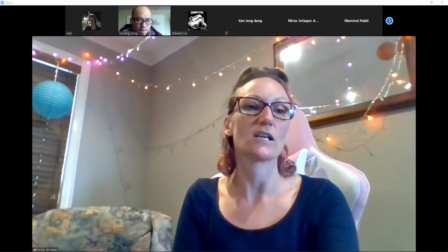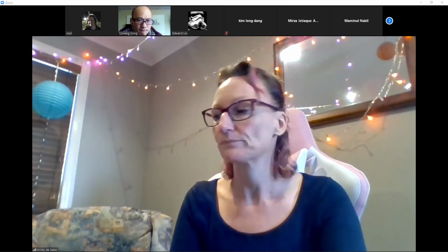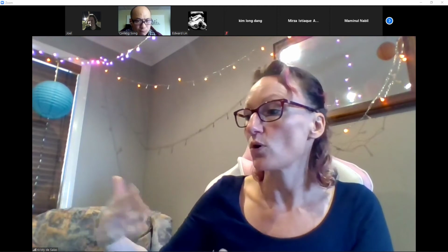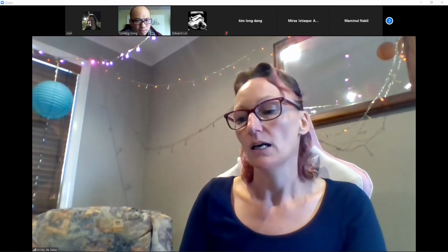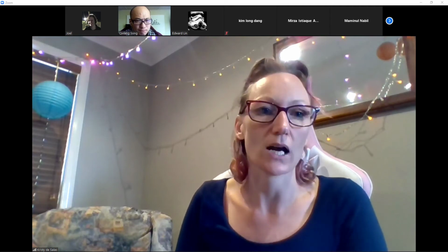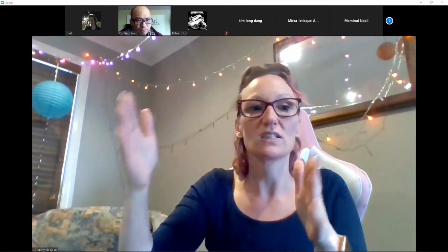So, do we need extra things put in our lab or whatever? And when is that actually needed? Because not everything is necessarily needed now. So, for example, hosting might happen later, or it might happen now, depending on what you're using it for. So just augment that section on resources with a little bit more specification on when these resources are actually required in the life cycle of your whole project. Is it first semester, second semester, Agile 3, whatever it might be.